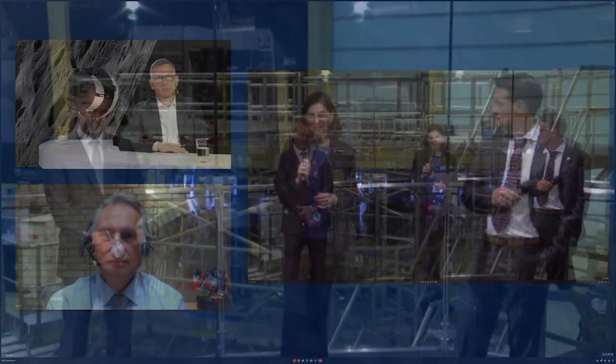Yeah, schedules are always complex when you have a complex spacecraft. And what I will tell you is that we are constantly evolving the schedules based on our suppliers being able to provide the hardware and being able to provide the elements that get integrated into the spacecraft. If you look at the spacecraft behind me, you'll see it has lots of piece parts to it, and all of those piece parts have to eventually come together for an integrated spacecraft. I will tell you that our original schedules on both sides had us delivering the ESM well before today or this week. But we are adjusting our schedules accordingly based on the delivery and the availability of the hardware and the testing that is required.